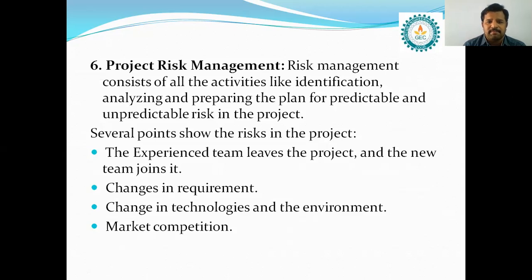The following are the several points which show there is a chance of the risk arising in the project. The first point is the experienced team leaves the project and the new team joins. The experienced team may leave the project automatically. In their place, the new team will join. Automatically, the new team doesn't know about the actual requirements of the project, so there may be a chance of raising the risk of errors.